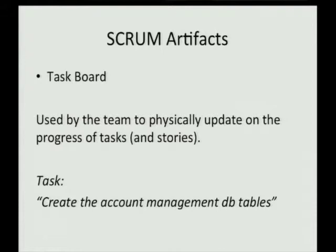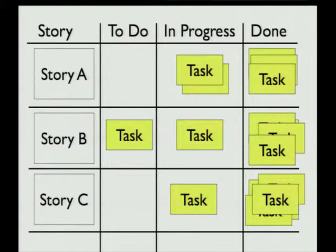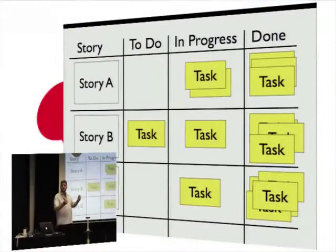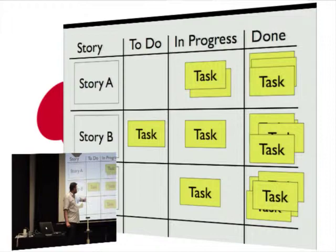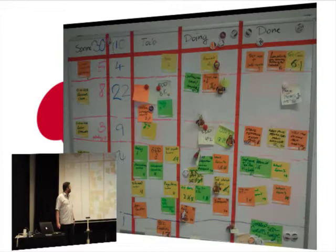Then you've got the task board — one of the first physical tools the team uses. They track the progress of individual tasks through stages of completion during the sprint. These are more technical in nature, being smaller parts of the stories. For example, creating database tables would be part of a story. The stories are ordered by priority on the board, starting in to-do, and stickies gradually move their way across into the done column.